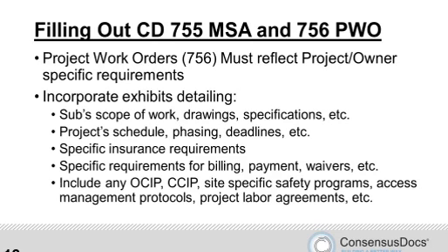But I'll point out here that on page 2, there's master documents, and that's section 2.2. Now, this master documents section is your opportunity to incorporate into your master subcontract agreement all of those documents that you use to manage your subcontractors. So there's one box here, but you can list as many as you want.